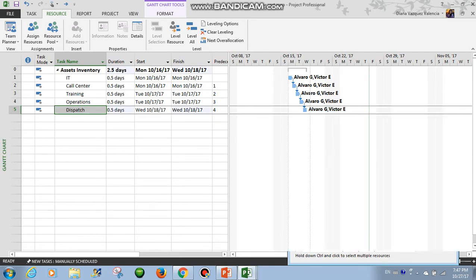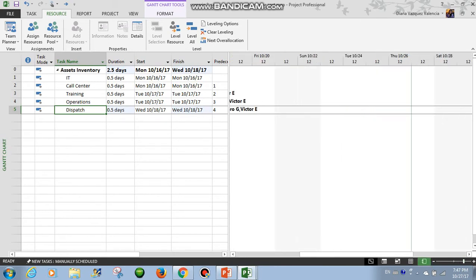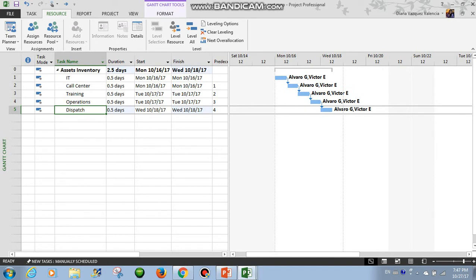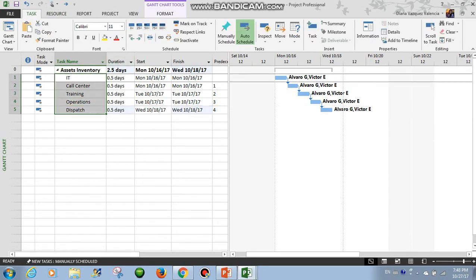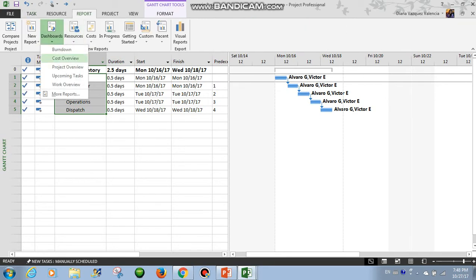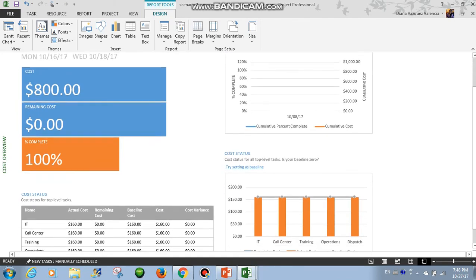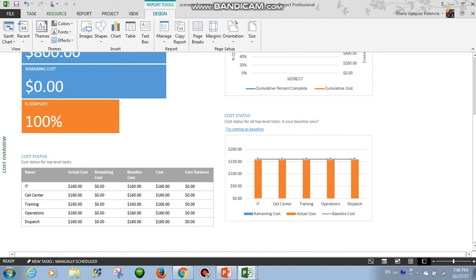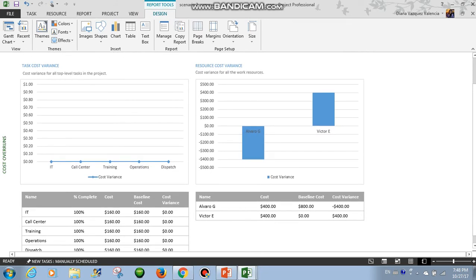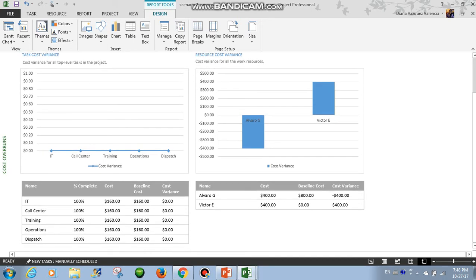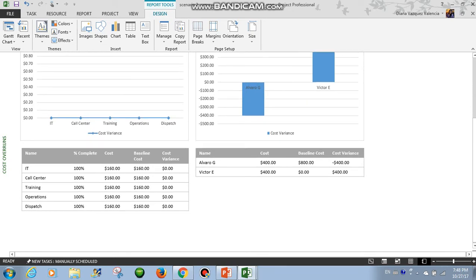So here we see they are finishing by Wednesday. And as the work is the same, we expect to have the same cost. So let's do our 100% here. Let's see the cost — it's the same. Same cost, no variance. And here in the resources we have a variance, because we added Victor. But the difference is that now Alvaro is working less time. So Alvaro is working minus $400, and Victor plus $400. So the cost is the same.